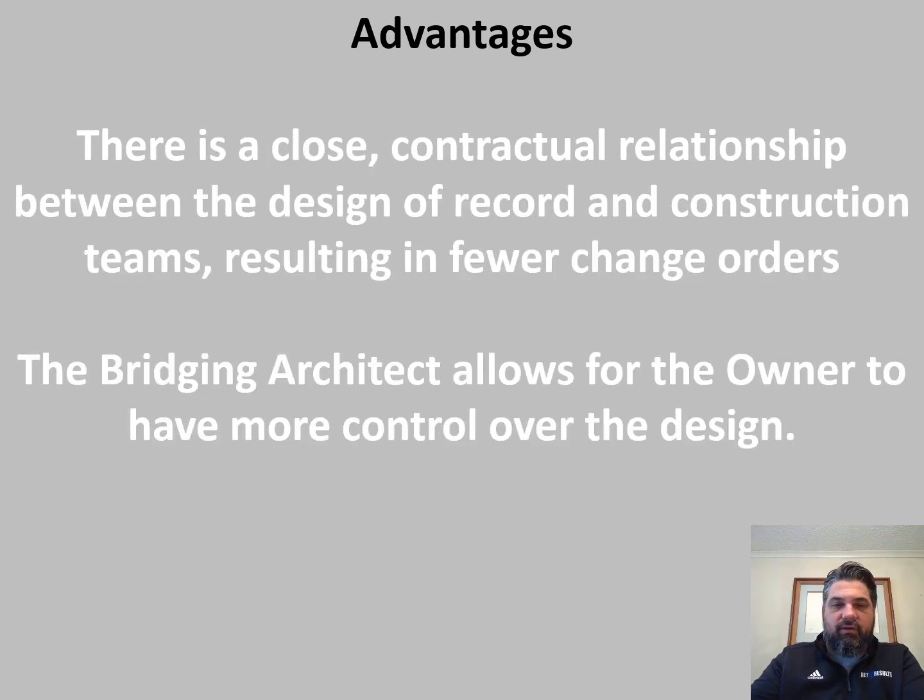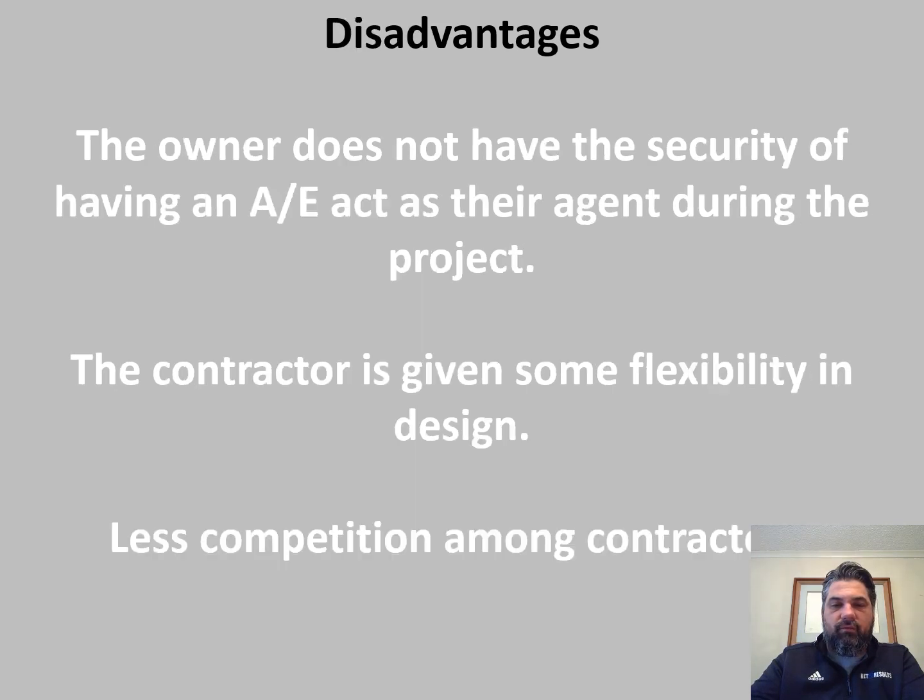Again, close contractual relationship between the design of record and construction teams, hopefully resulting in fewer change orders. And then the bridging architect allows the owner to have more control over design. Very similar disadvantages to the previous. The owner does not have the security that the AE is acting as their agent during the project, and it really depends on the scope of the bridging architect during construction. Typically, it's an extremely limited role.